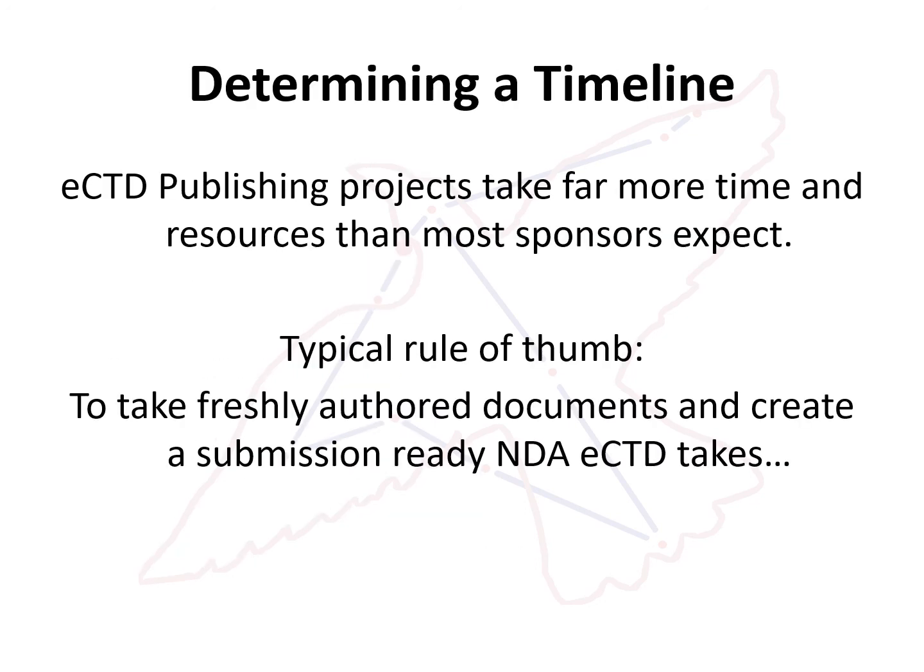eCTD publishing always takes more resources than the sponsor plans. Based on the numbers provided here, a typical rule of thumb for how long to expect your NDA to take just to go from authored documents to your final hit the button send to the FDA is 2,000 man hours.